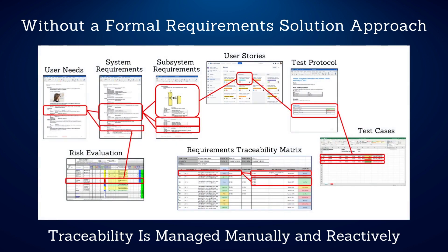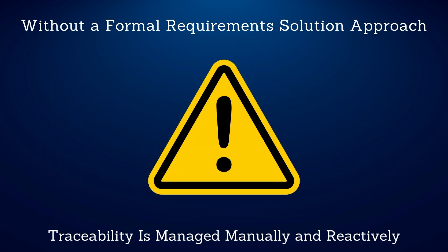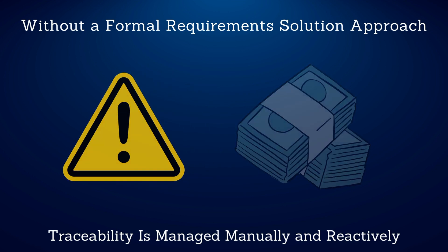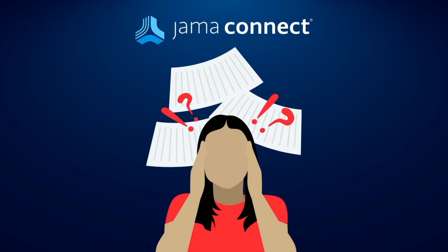In this type of scenario, engineering often finds it difficult to manage and maintain complex traceability as they work, so they often leave it to be completed at the end of a phase or milestone, as opposed to maintained in real time. This often leads to gaps or errors being identified late in development, which is significantly more costly to address the later they're identified.